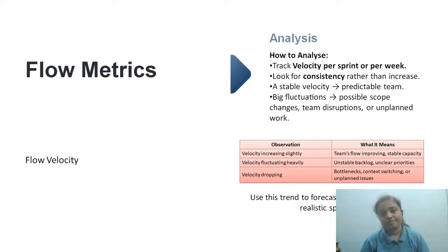because of the delay. Next thing, context switching, multitasking. Oh, I'll do this, I'll do that. Okay, I'll complete this. Two items are going to be in an incomplete state. Unplanned issues, suddenly something coming in disturbs the entire flow, and you try to complete this, and this is priority. You started doing this, you are in the middle of this, velocity will drop.